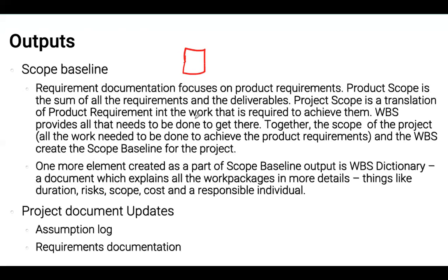You might just have a box with 7.5.1, which is your work package ID, and then the work package name will be crank for widget cranker or whatever it is. So that's the work from the work breakdown structure, but that will translate into 7.5.1 Crank, which will give us a name, an estimated schedule, an estimated cost, a person responsible, and so on.